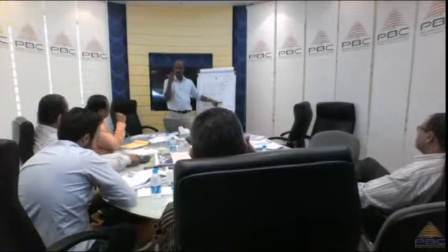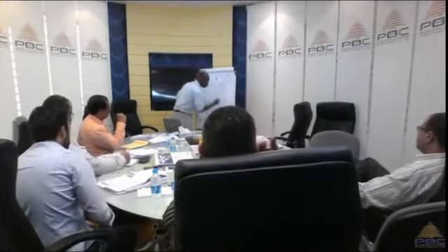So this gives me the dimension of schedule variance. We're behind by 1 day. We call it $1, and $1 compares to 1 day, so we express it in terms of dollars. We're behind by 1 day, and this is called the schedule variance.